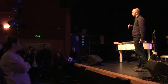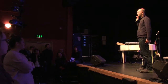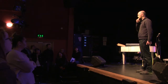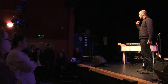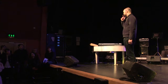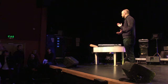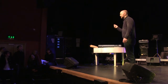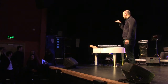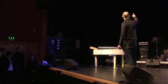We definitely would, well, here because we can bring it in. It's a 4-hour rig, but that's only literally getting the lamps on and up. It would take 6 hours at least to get it ready back to this. But that's only because we have a colour library here, and Eamon has that gig rig in his head memorised. I mean, he could do it probably in 20 minutes, but come on. But the benefit of memory, it takes around about 2 hours. But that's a basic gig rig, if it's in your head.